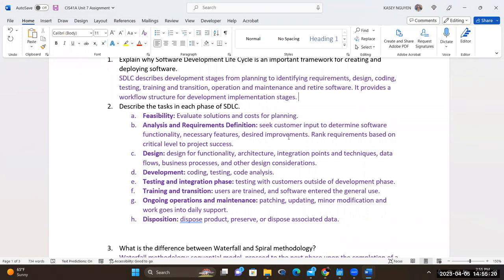Ideally, it's important that you rank the requirements based on the critical level. I normally ask for what you absolutely need first, right? And I would rank that high. Let's say it's 1 to 5, 5 is the highest. That's something they must have, right? That comes in first. Then after that, something that they desire. That means that it's optional. If we have to knock something off, that could go off the list, right? So you would rank them based on the priority of the needs. Once you have that, you would be able to look at what's critical and to be able to achieve success.